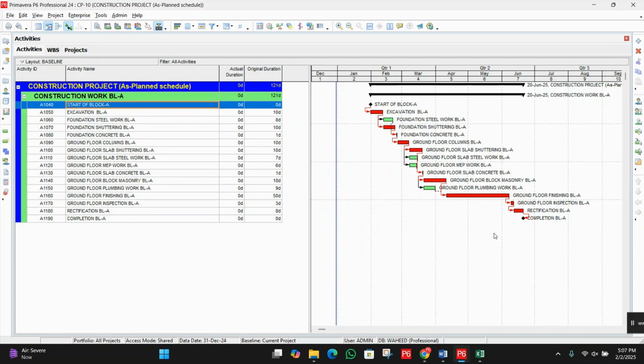The amount of owner-caused delay is determined from the as-built but-for schedule delay analysis, quantifying the contractor's entitlement to receive compensable delay damages.